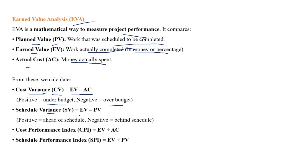Schedule Variance (SV) = EV minus PV. If the schedule variance is positive, you are ahead of schedule — meaning you completed more tasks than planned in the given time, work is efficient. If negative, you are behind schedule — for example, 4 tasks were planned for 4 days but you only completed 2 tasks. That means you are behind and will not complete on time.